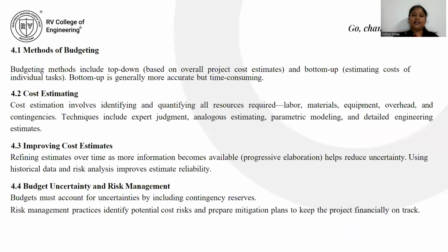Then the cost estimating. It involves identifying and quantifying all resources required: labor, materials, equipment, overhead, and contingencies. The techniques include expert judgment, analogous estimating, parametric modeling, and detailed engineering estimates. For improving cost estimates, it involves refining estimates over time as more information becomes available, which helps to reduce the uncertainty. Using historical data and risk analysis improves estimate reliability.